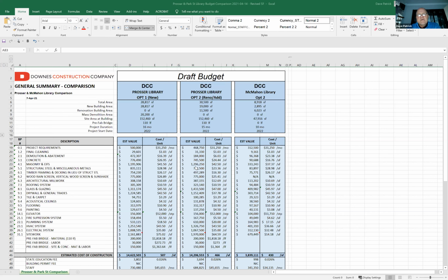And at the schematic design estimate stage, we can really start to count things. We can start to put quantities on things. And then when we go to the design development level, we can really put some effort into quantification and material selections. So it's really a refinement process that goes from conceptual to schematic design to design development to construction documents. And that's in essence how the process works.